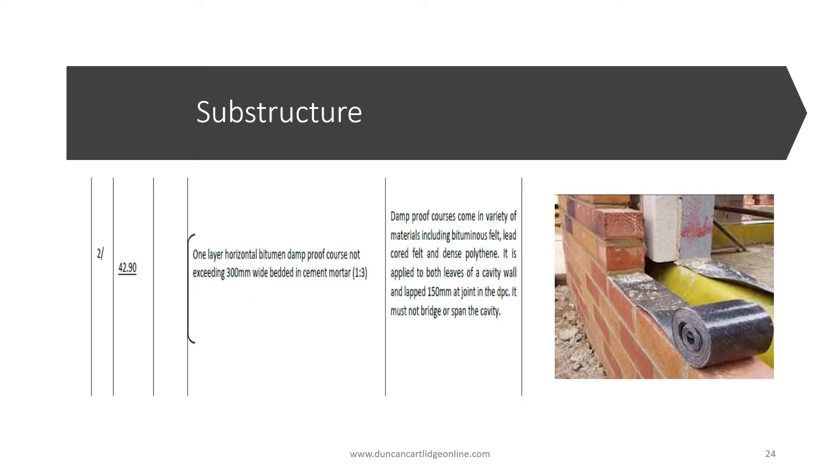A damp proof course, or DPC, is required for both skins or leaves of the external wall. Bitumen damp proof course is supplied in rolls approximately 30 meters long. At the junctions of the rolls, a damp proof course is lapped 150 millimeters. But when taking off quantities, this is not considered and the DPC is measured net. The estimator should add an allowance to cover for this.